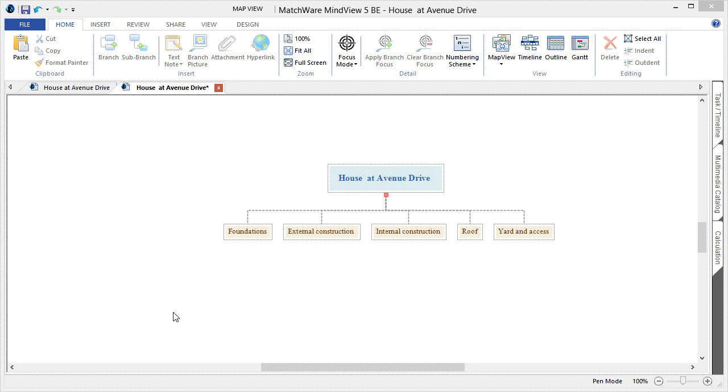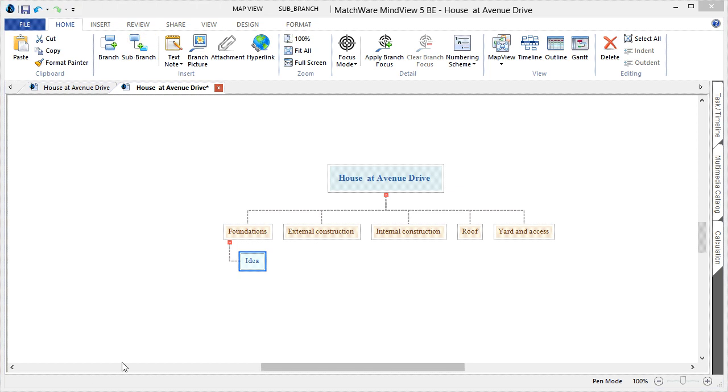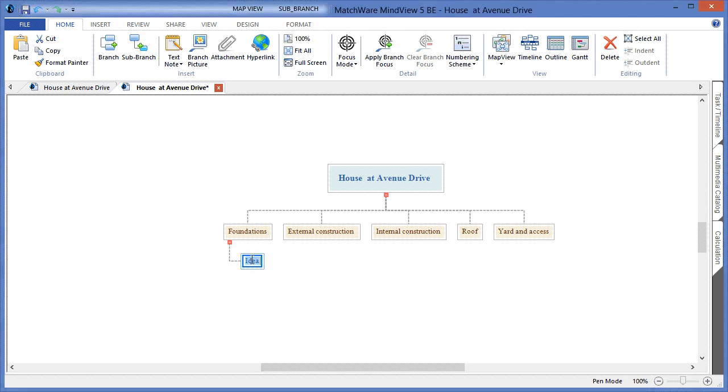The next stage is to break down the tasks or work packet items that belong to each individual deliverable. Let's begin with the Foundations. To create the next level, simply choose the sub-branch icon from the ribbon. Our first sub-branch element will be listed as the Interior, Development and Design.